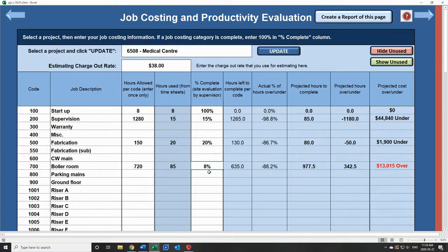You can't speed up men. You can't tell the guys to work faster. That doesn't work. But what we can change is maybe the configuration of the team on site. We can change the tools they're using. We can change the scaffolding and go to maybe a scissor lift. I mean, there are many things we can do so we can be more proactive, so we can mitigate that. We can change the outcome. And this is the important part of this tool, that it allows you to change the outcome.